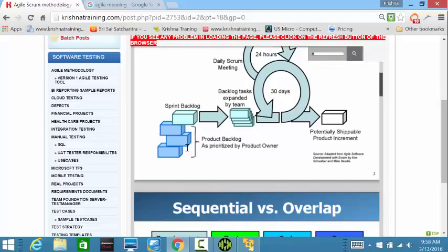So before we start the sprint cycles, they have to make sure that requirement one is at least ready for the team to start working on it. So that's how one requirement would be available. They will push it to both the teams, saying go ahead and do the development, and testers team, go ahead and document the test cases. And the analyst team will be working with the clients to gather the requirements for all other requirements, requirement 2 or requirement 3 or requirement 5.